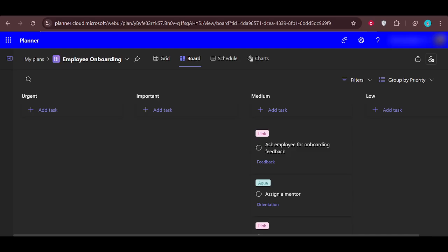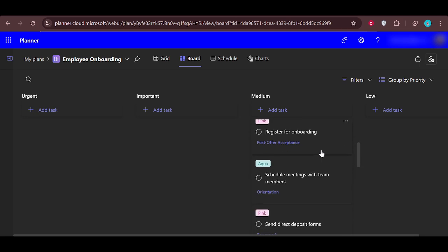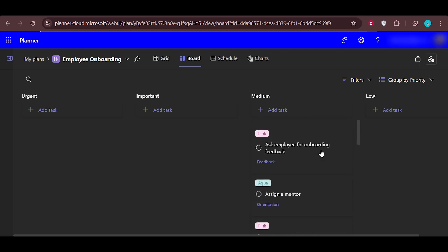Now, with the grouping turned off or adjusted, you can actually focus on the critical path itself. The critical path in Microsoft Project is not shown through grouping. Instead, it is indicated through formatting and filters. Typically, critical tasks are highlighted in a different color on the Gantt chart, often in red, and you can turn this on through the view or filter settings.